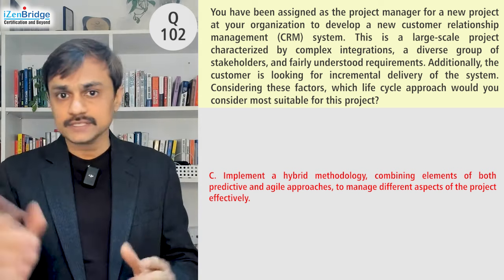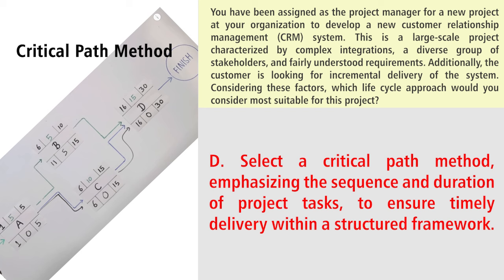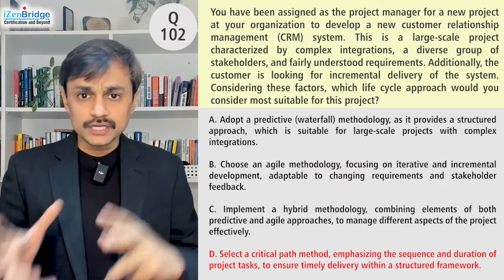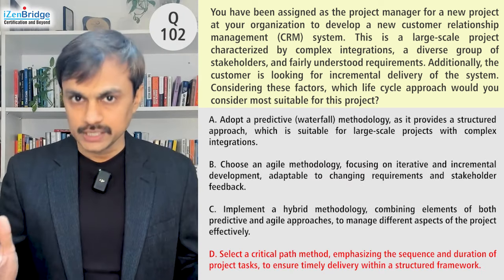Option D: select the critical path method, emphasizing the sequence and duration of project tasks to ensure timely delivery within a structured framework. However, the critical path method is a scheduling technique — it is not a life cycle. It can be used within predictive or hybrid approaches. In pure adaptive approaches, we use sprinting, stories, and incremental release planning rather than critical path. So Option D does not fit because we need to select a life cycle approach.